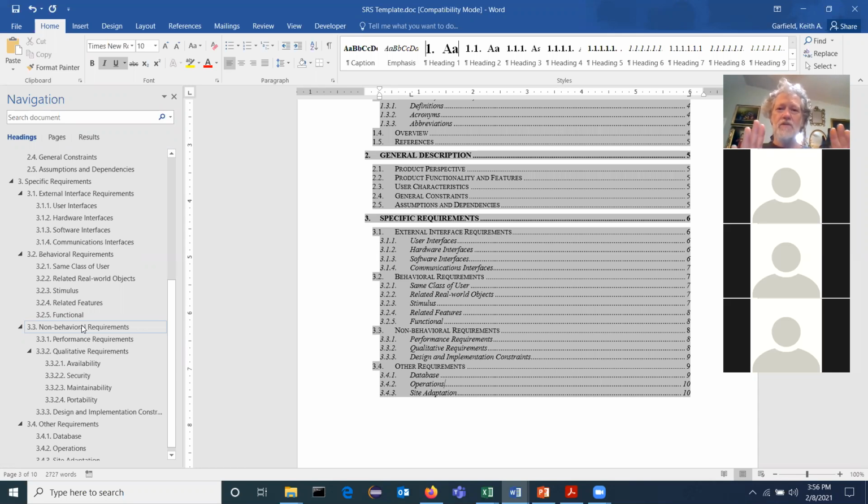After the first sprint, I want you to fill out these for the user stories that you've completed. Now your team has to describe how that works. When you're doing your sprint planning meeting, okay, here's the user stories that we're going to take in. At that time, you need to define what the notion of done is, right? We've talked about that a little bit before. So for your user story, the team decides, okay, how do we know if this is done? And your team defines and decides and agrees on how that's completed. Okay, I know when a user story is done when these things occur.